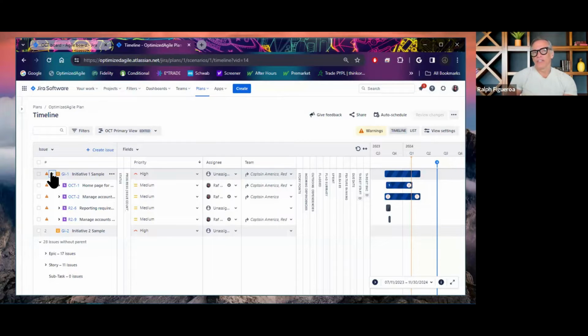You could create custom issue types, and in Jira itself, you can actually map the hierarchy that this particular issue lives under. For example, if you have an issue type called theme, higher than initiatives altogether. OKRs are an example. I have seen organizations that create custom issue types to keep track of OKRs.